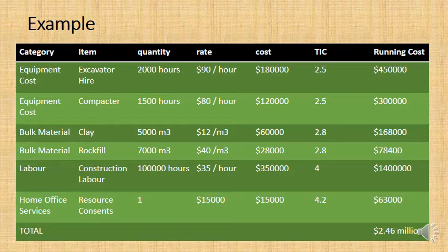And so all of those items on the far right column, we can add those together, and that means that our estimate to build this project, to build this dam in Colorado, is $2.46 million. And that is going to be reasonably accurate. It's going to be more accurate than the cost capacity curves or the exponential factored predictions. And it doesn't take too much work.